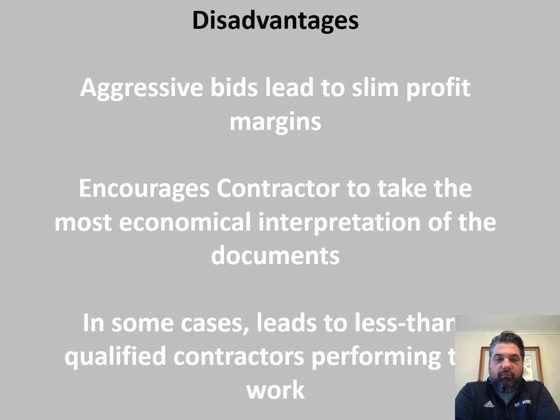But then going forward after they're contracted, it really encourages the contractor to take the most economical interpretation of the contract documents. And so what they will do is try and find ways that they can save money either on materials or execution methods in order to reduce their costs and maximize their profit.